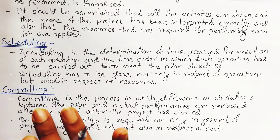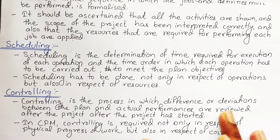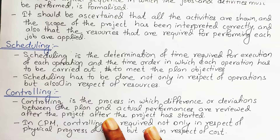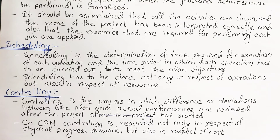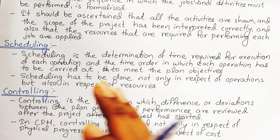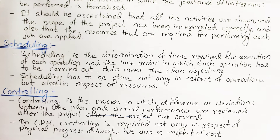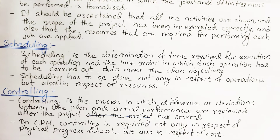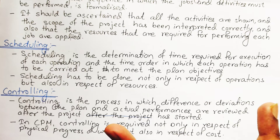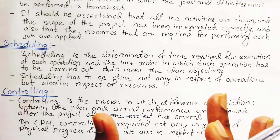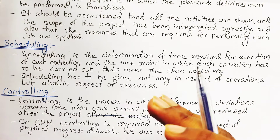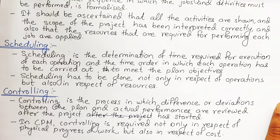The final step is controlling. Controlling is the process in which differences or deviations between the plan and actual performance are reviewed after the project has started. In CPM, controlling is required not only in respect of the physical progress of the work but also in respect of cost — since CPM is fundamentally about cost and time — so that the project does not exceed the contracted amount.